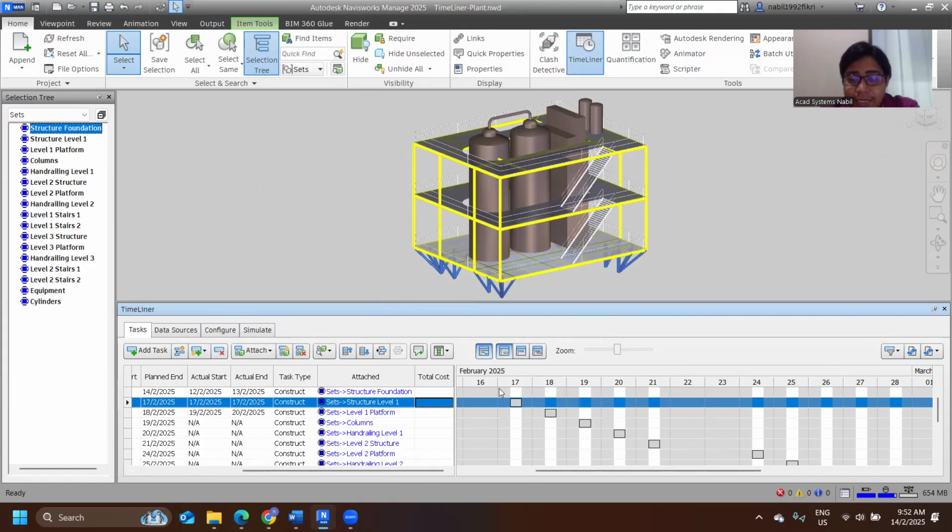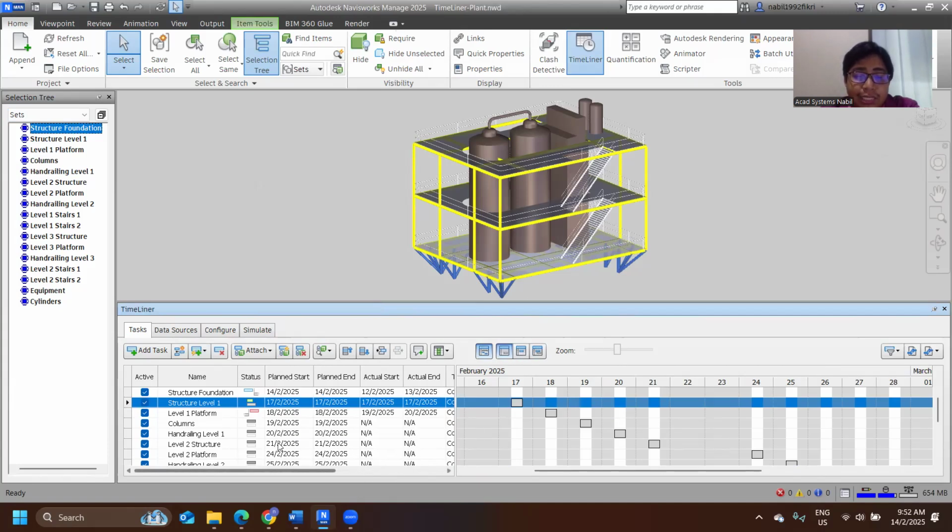On the right side here, we have the Gantt chart. This one basically allows you to see the dates that you have added before. We have the planned dates for the Gantt chart. If you want to show the actual, then you can select the actual dates, and it will show the Gantt chart from the actual dates. I can also show the comparison, or versus, between these two, so you will see the actual and also the plan.